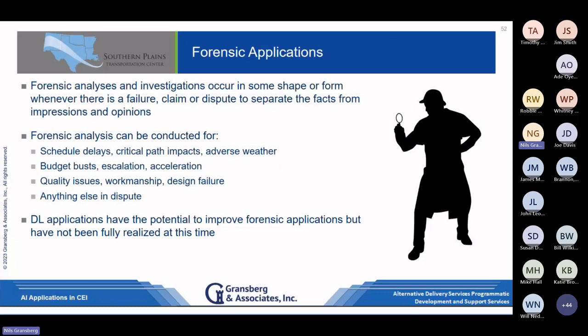Now, forensic analyses are usually only necessary when we've got a delay or a claim or a dispute or something like that, or a question about what's actually happened, and we have to do a little bit of digging, figure things out. When it comes to being well prepared if you do go into a claim or a dispute, you really have to make sure you've satisfied what you've got to do in the contract. You've got good documentation. You've done a decent job of administering the contract, administering the project, and you're able to access the data and the reports and the photographs and you name it, of anything that you need to go in and be well prepared.